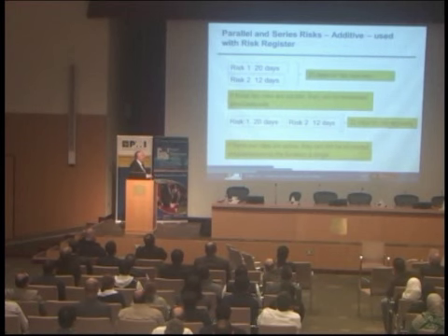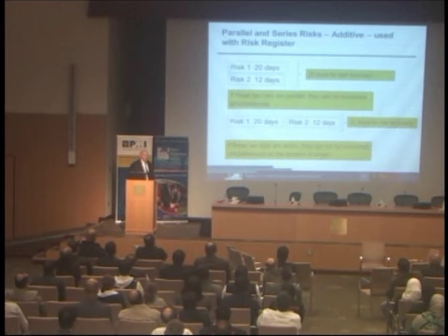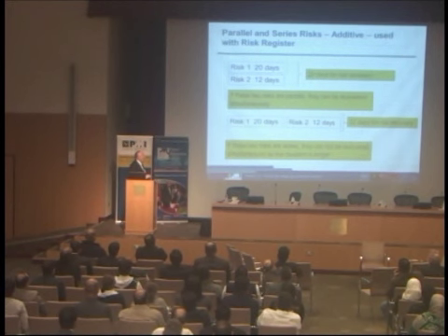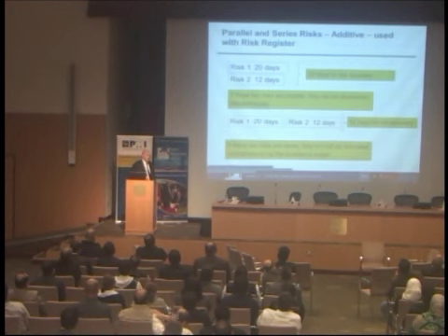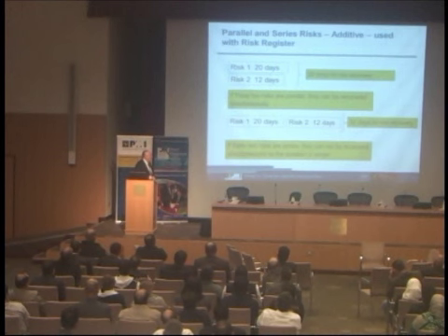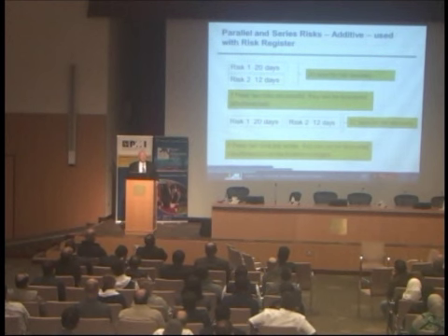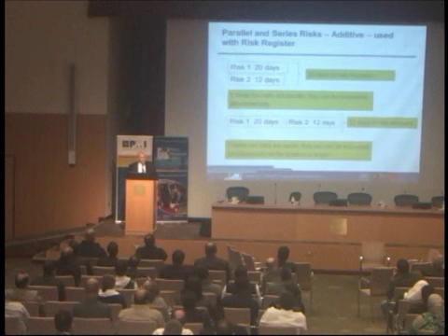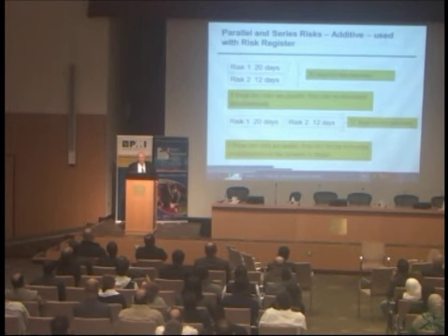Series is what we've always had, parallel in the software packages, but it's really crucial because some of the risks really are recoverable in parallel. So a 20-day and a 12-day risk will be 20 days for the risk recovery, but if they're in series, it's really 32. Okay? So you have to think about which risks there are and how they might react in those iterations, which is your possible project, when both risks occur together.